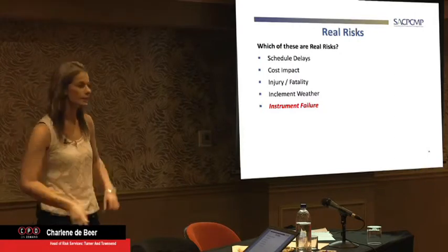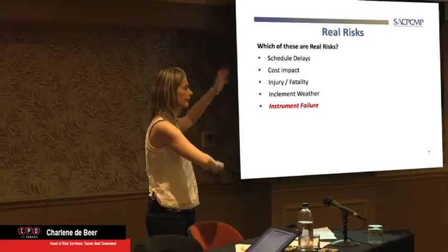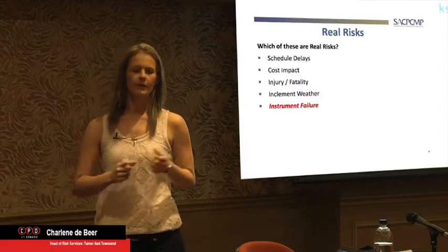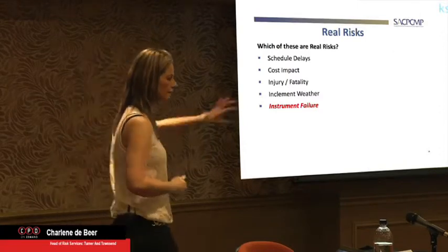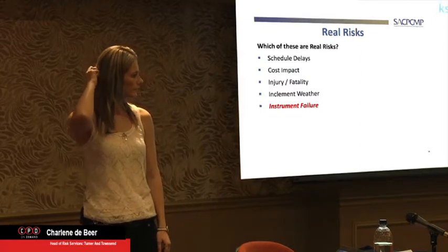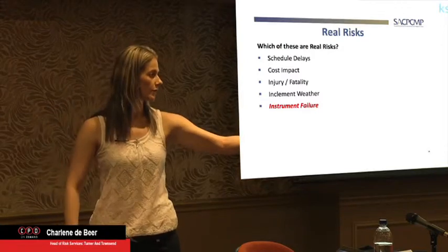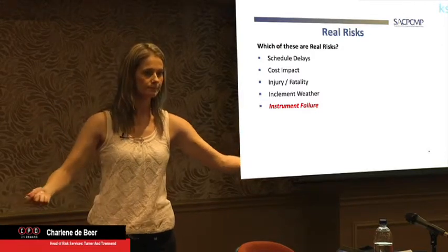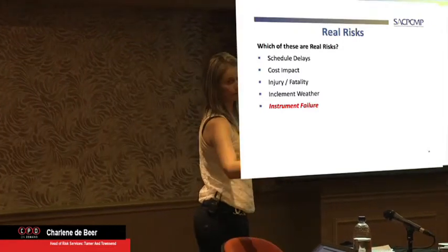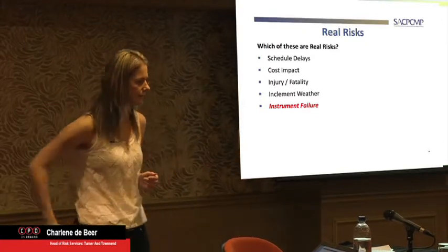It's a cause. It's because it rained a lot, or the wind is, we can't lift because the wind is about 15 kilometers or whatever the OSH Act says. So what is the risk? What do we face if we have adverse inclement weather conditions? It could bring civils and earthworks to a halt on site, for example. If we decide not to mitigate and say we're going to weld in cocoons, because we can weld in cocoons, we might say, well, welding could be affected.